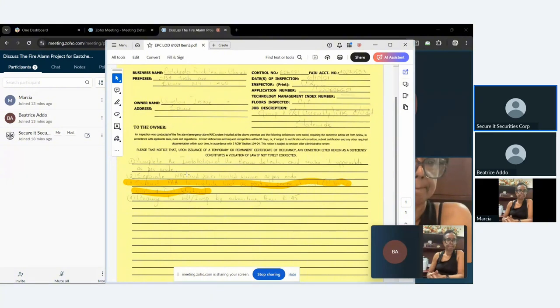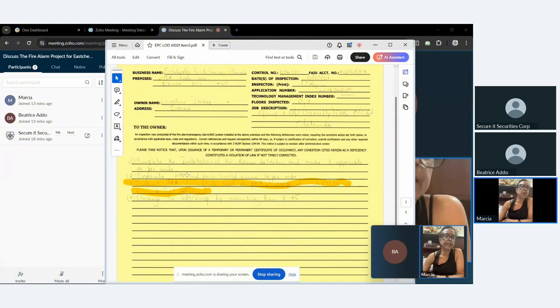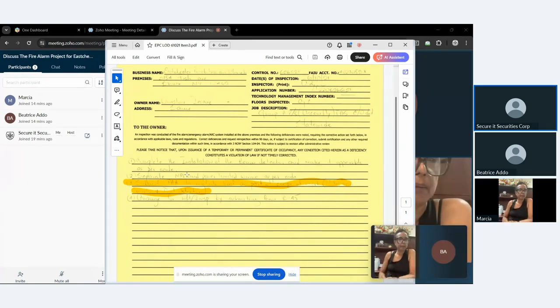To make the amendment, we have to take 'attic' off the design, make it say 'second floor,' and resubmit the drawings as if we're filing for the first time. Anything that says 'attic' has to be changed to 'second floor,' and the paperwork submitted to the fire department has to reflect the same change so they can review and approve the drawings.